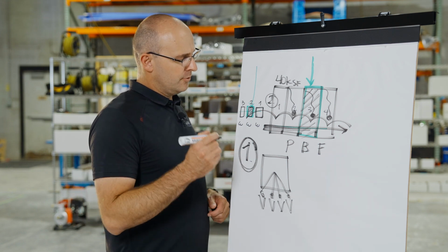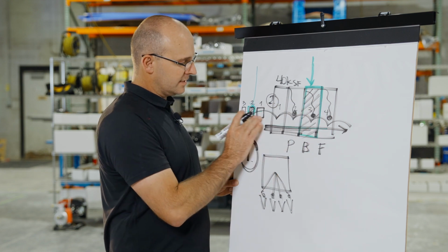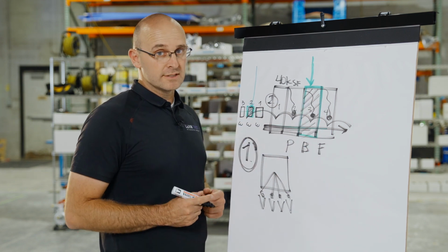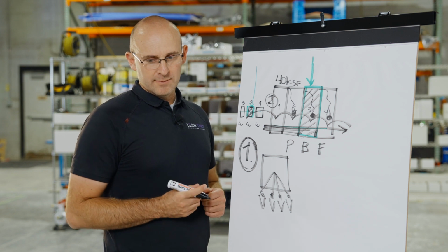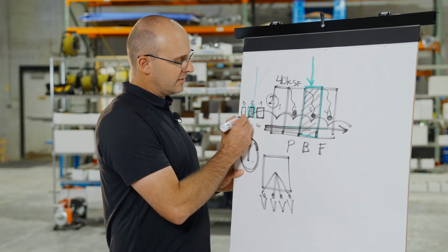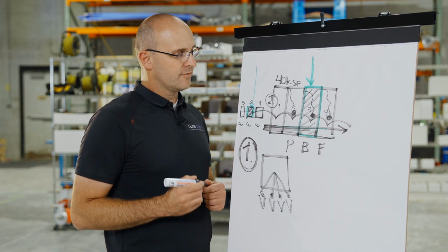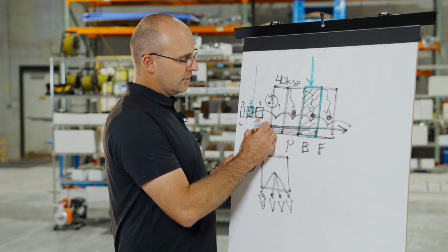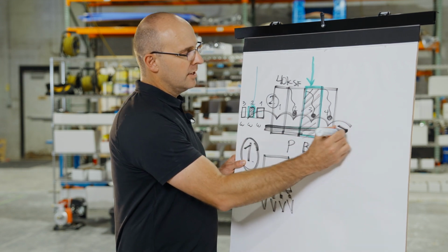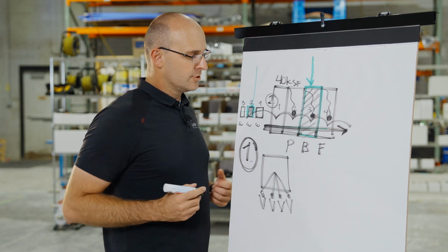Number 2, you must make sure that you are going in the same direction and that you're in the same sequence. Those are concepts number 2 and 3. Concept number 4 is that you must make sure that you're adding the same amount of value through the same amount of work in your zones. Those are concepts number 4 and 5. Number 6, going the same speed like we talked about. Concept number 7, the same distance apart from each other so that you're really flowing.